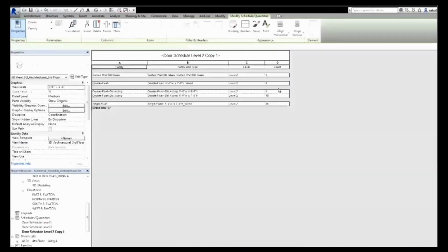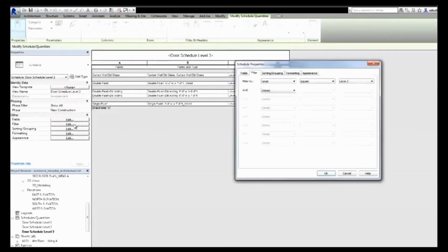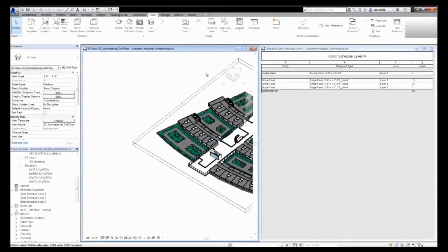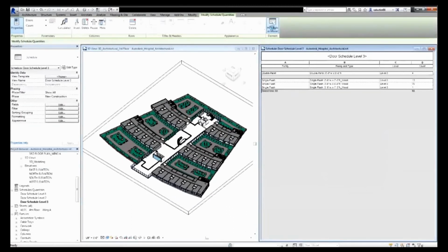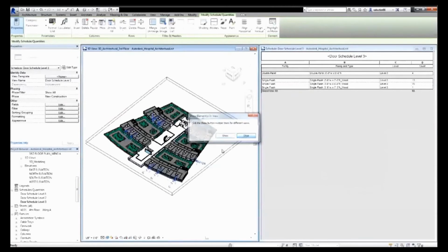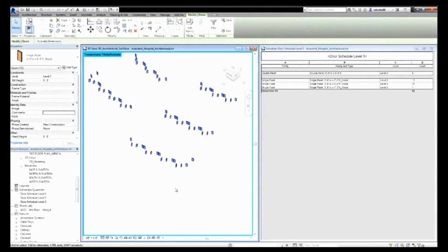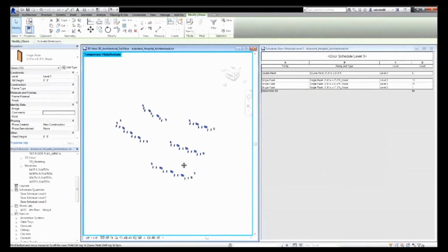Today, estimating process rely heavily on 2D documentation and model counting of project elements and components which can be prone to error and very time consuming. Here we can see how Autodesk solution provides several ways to gain access to the quantity information early in the planning process. By leveraging tools directly from Revit and Navisworks, we can quickly get a high-level understanding of the project quantities. Case schedules or tables of data built from the 3D model created by the designer can be used by adding counts and even totals.